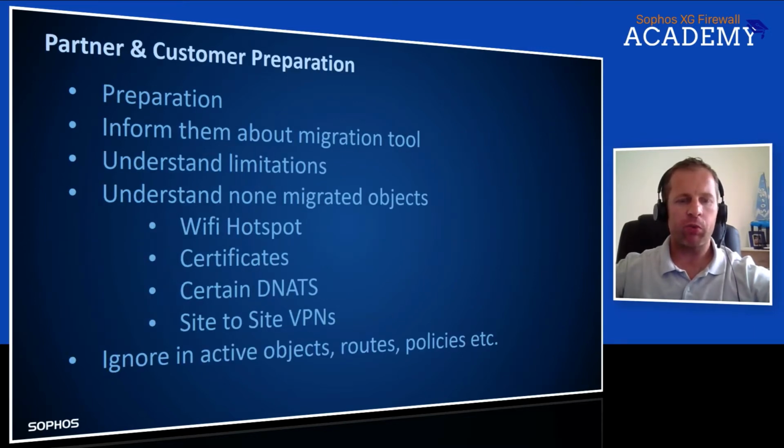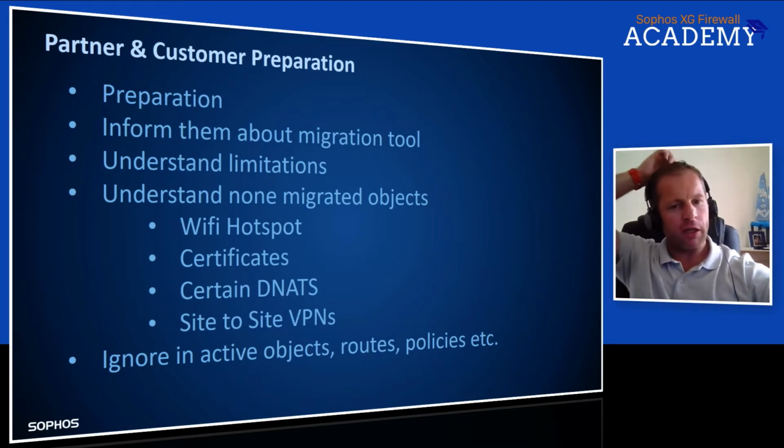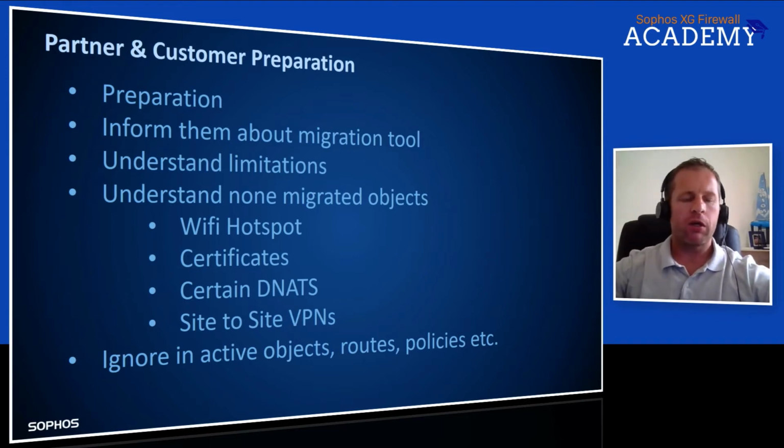So what was key? The key was preparation. Obviously, we had to prepare properly. We had to log on to the actual SG and make sure we've got all the config ready. There's a lot of nitty-gritty things you can forget about, like site-to-site VPNs. One of the things that caught us was that they had a hotspot portal on the SG.